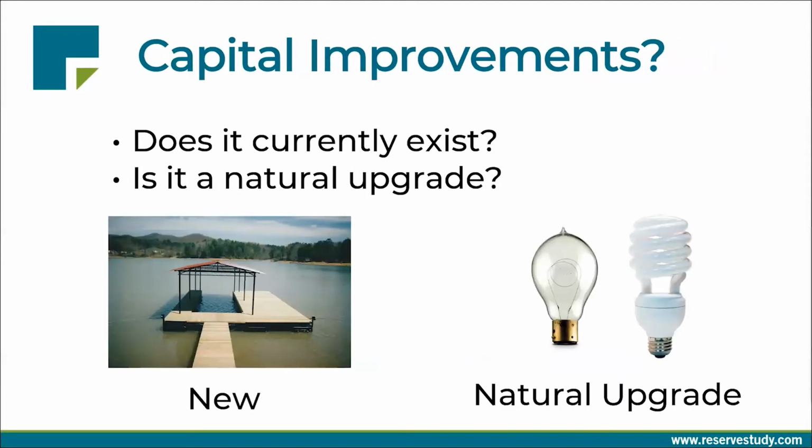Okay, well, when you get to a decision point where you need to replace something, is it ever okay to upgrade a component, or are you forced to replace like with like? Yeah, you shouldn't be spending reserves adding new assets to the association where one previously didn't exist. That's the key. But if the asset needs to be replaced, sure, it's totally fine to do an upgrade that brings added value, is consistent with the technology of today. And again, you don't want to be adding new assets, but that's the cut point. So remember, if the asset or project exists, is the key distinction.